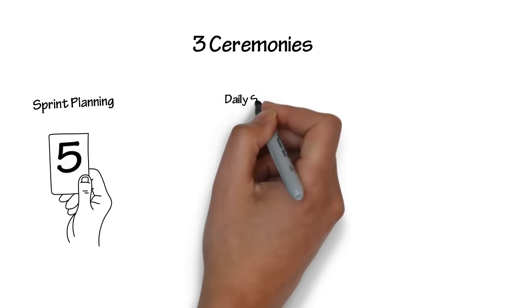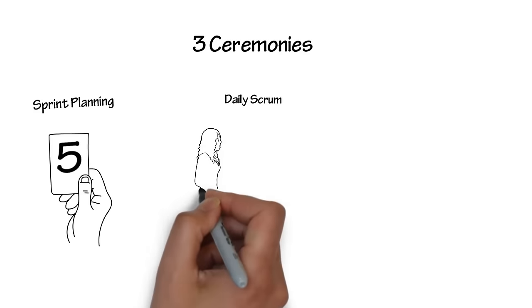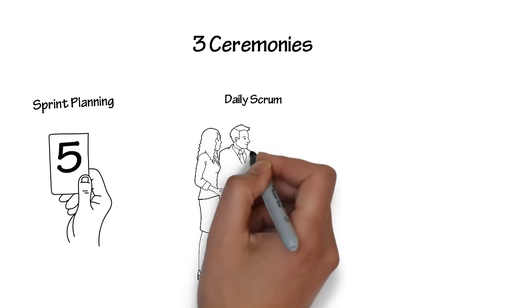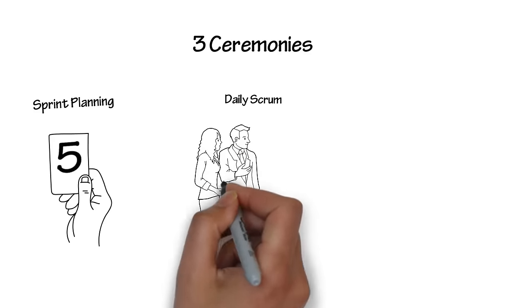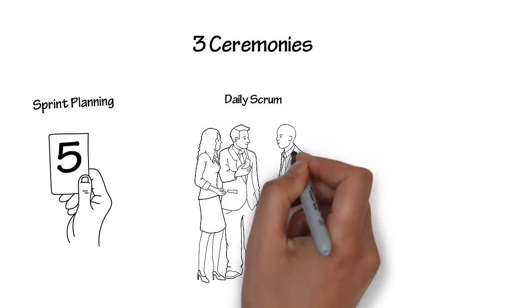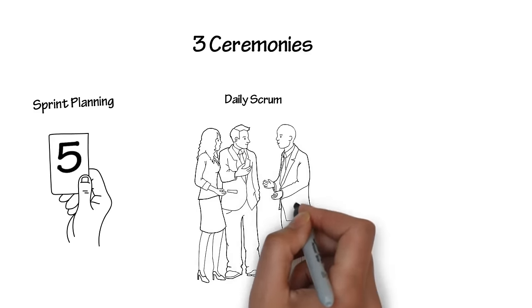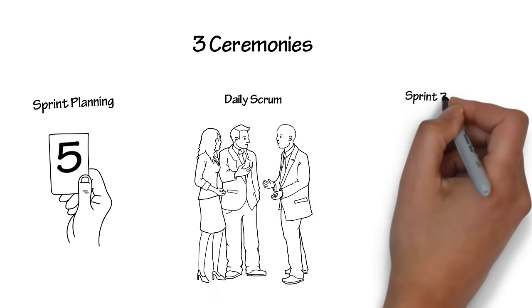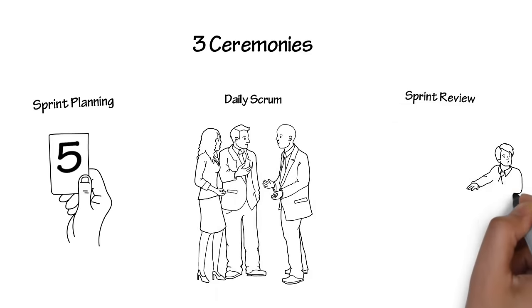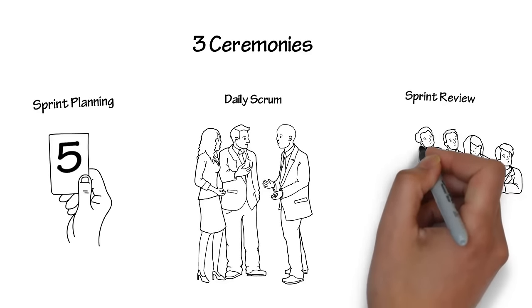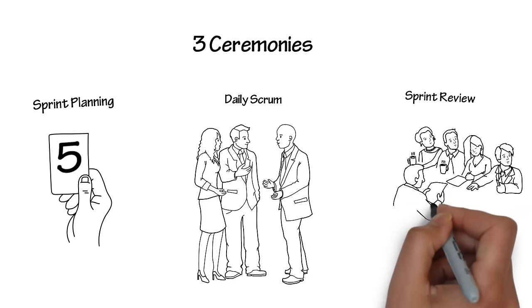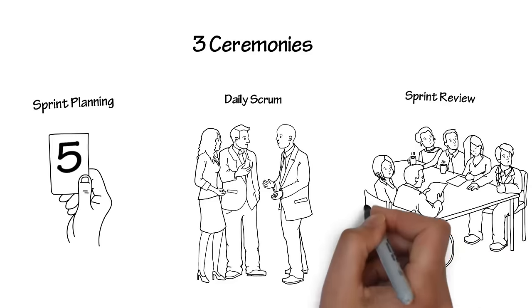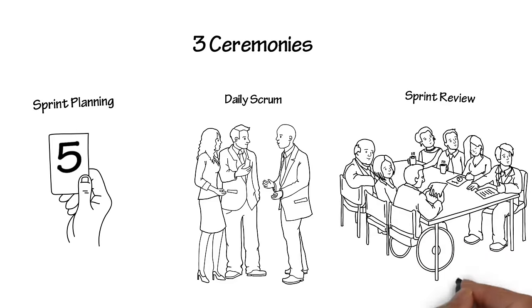The daily scrum is a brief stand-up meeting where the team discusses what they have completed since the previous meeting, what they're working on, and anything that might be blocked or need help. The sprint review and retrospective occurs at the end of the sprint. This is where the team demonstrates the completed work to the product owner, and then the team discusses what they can do to improve the process going forward.